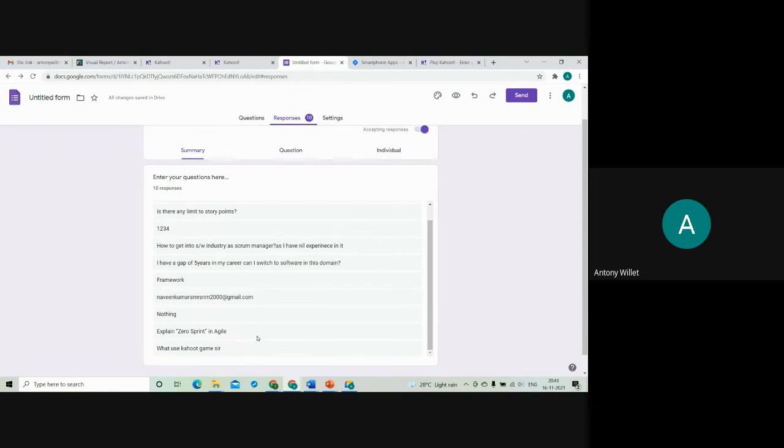They do all these things like technical analysis, and very basic or rough architecture or design. They want to go for training so that they can start working from the next sprint. So that sprint, of 1, 2 or 3 weeks, which is a preparation for the project, is called a zero sprint or no feature sprint.